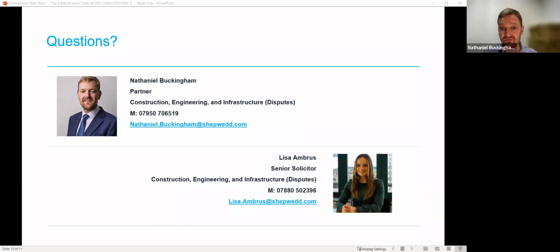So what we would say is always read the decision carefully, but alongside the submissions. One thing people sometimes forget to do is consider the decision against the other side's submissions as well, rather than just your own. You might think they've not come to a decision that relates to your submissions, but it might be because it relates to the other side's submissions. And where an adjudicator's clearly referred to submissions and walked through the reasoning that arises from those submissions, it's likely the decision will be fine.